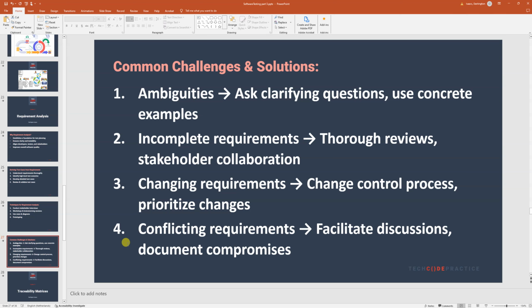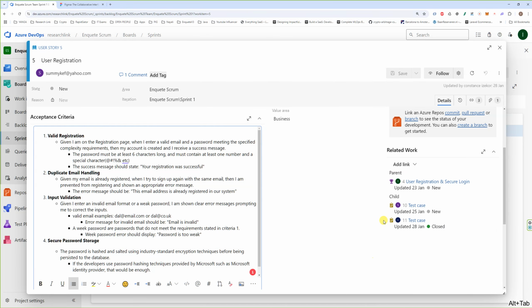Now, coming into tech, or into projects like this, what you do is exactly what I explained. When you as a team, or as a tester, because as a tester you're also part of the team, have a proper change requirement: if the stakeholder comes and says, okay, I don't want 6 characters anymore, I want 5, then as long as the project has started already, the project has to complete, and you have to write a whole new user story for that implementation.